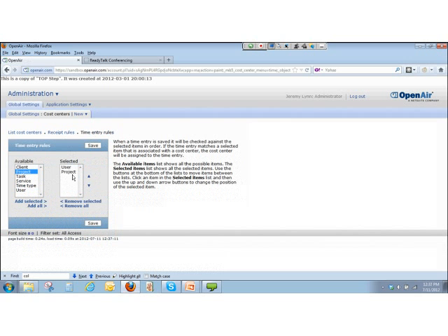and that's what would be associated to the hours for that person. And so the way that the rules work is it looks at the first field in this list that you set up, and then if that doesn't have a value, it drops to the second field. If that doesn't have a value, it drops to the third field, and so forth.